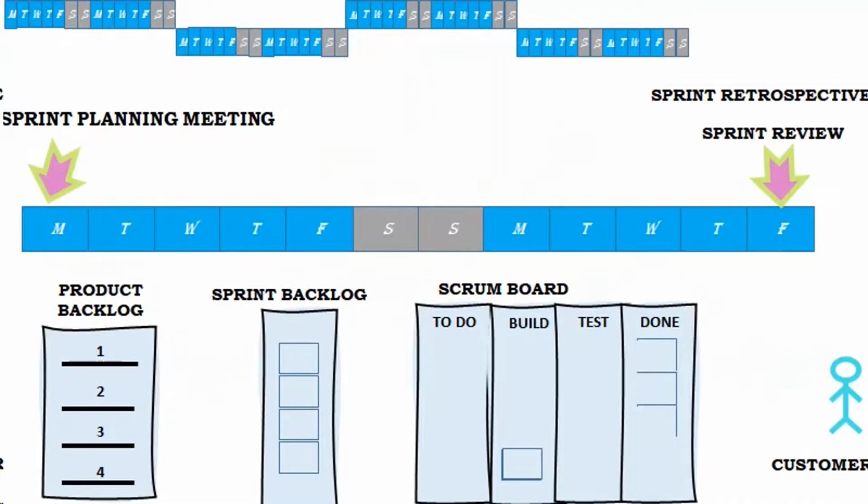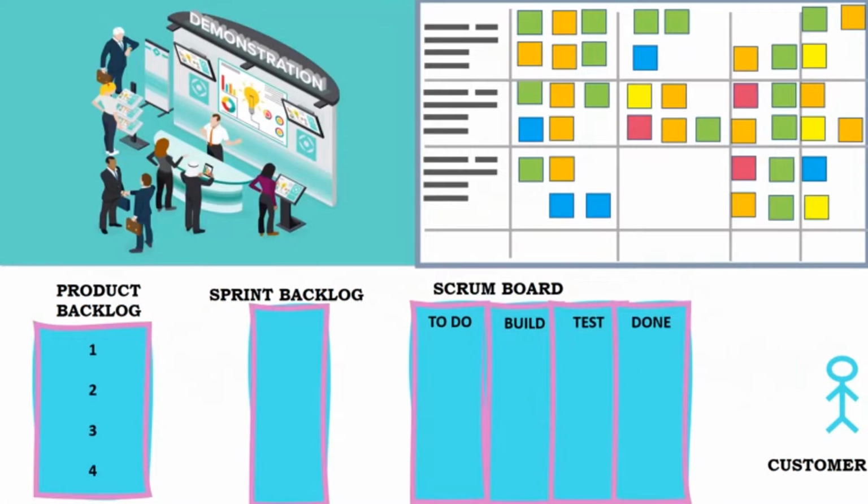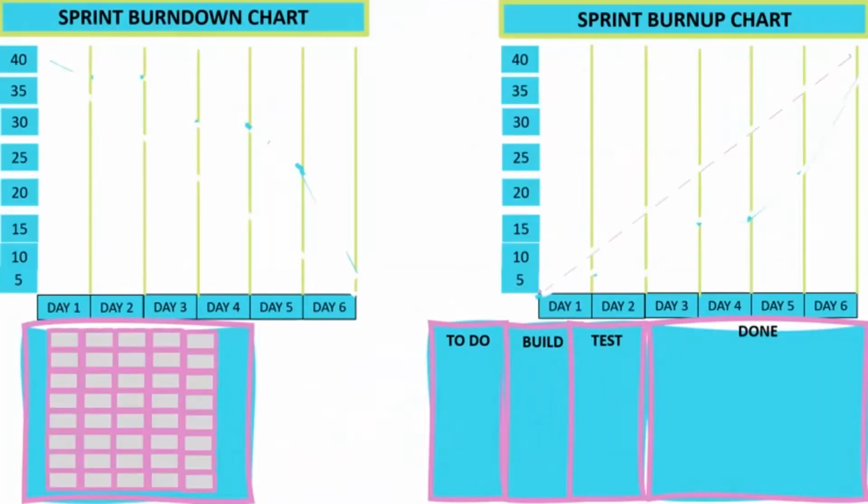In Agile, if there is low variability in the team's work and if the team members are not multitasking, the team's capacity can become stable. This allows better prediction for the next couple of weeks. After the team completes work in iteration, the team can replan. Once the team establishes a reliable velocity, average stories or story points per iteration, or the average cycle time, the team can predict how much longer the project will take.